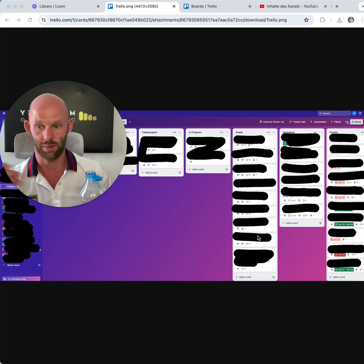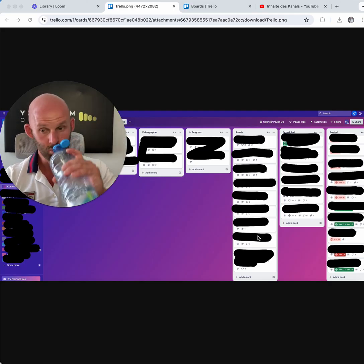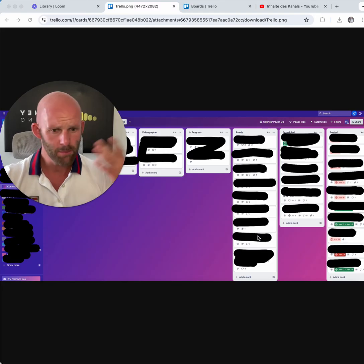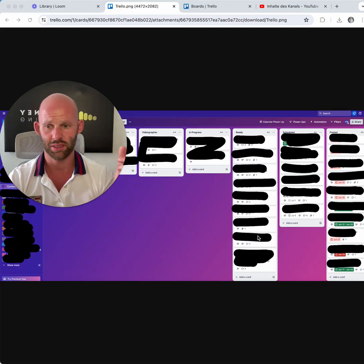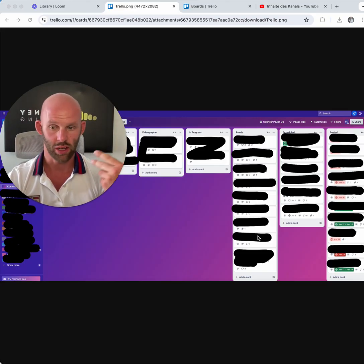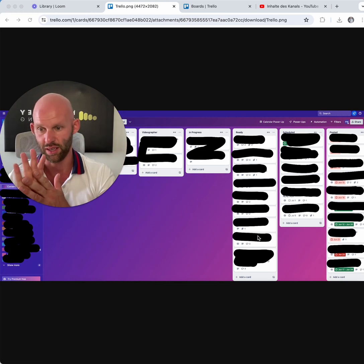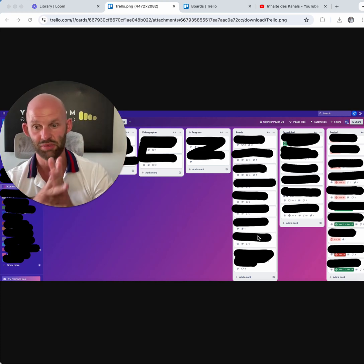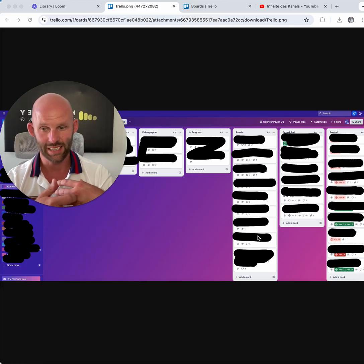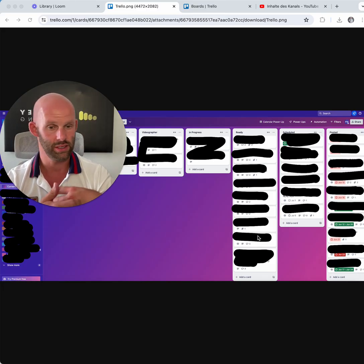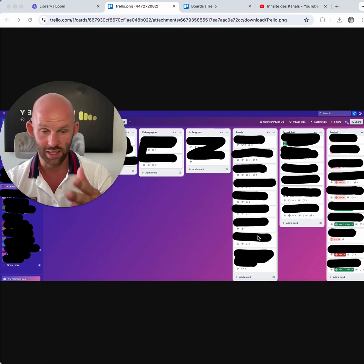You can assign team members to relevant cards very easily. You can use due dates and labels to prioritize tasks. You can elaborate by adding comments, attachments, and checklists to cards — great for bug tracking as well. After go-live, for example, you can set up a separate board for bug tracking with lists for different bug priorities: high, medium, low. Each card represents a specific bug or issue, and you use custom fields to note bug details, severity, and affected modules.